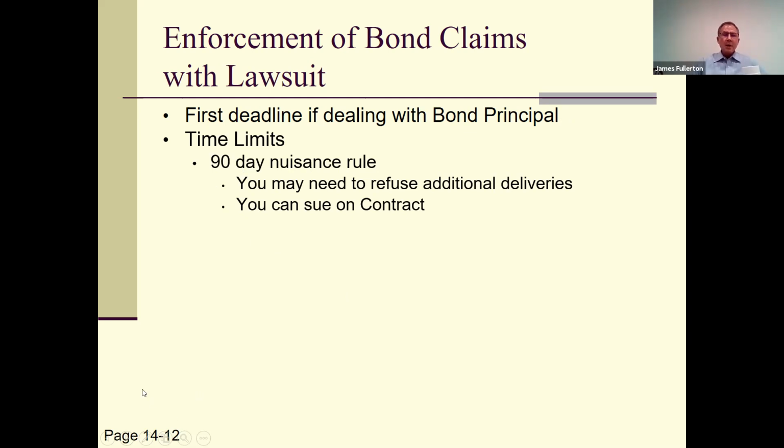You're not allowed to file suit under the bond until 90 days after your last supply on the project.